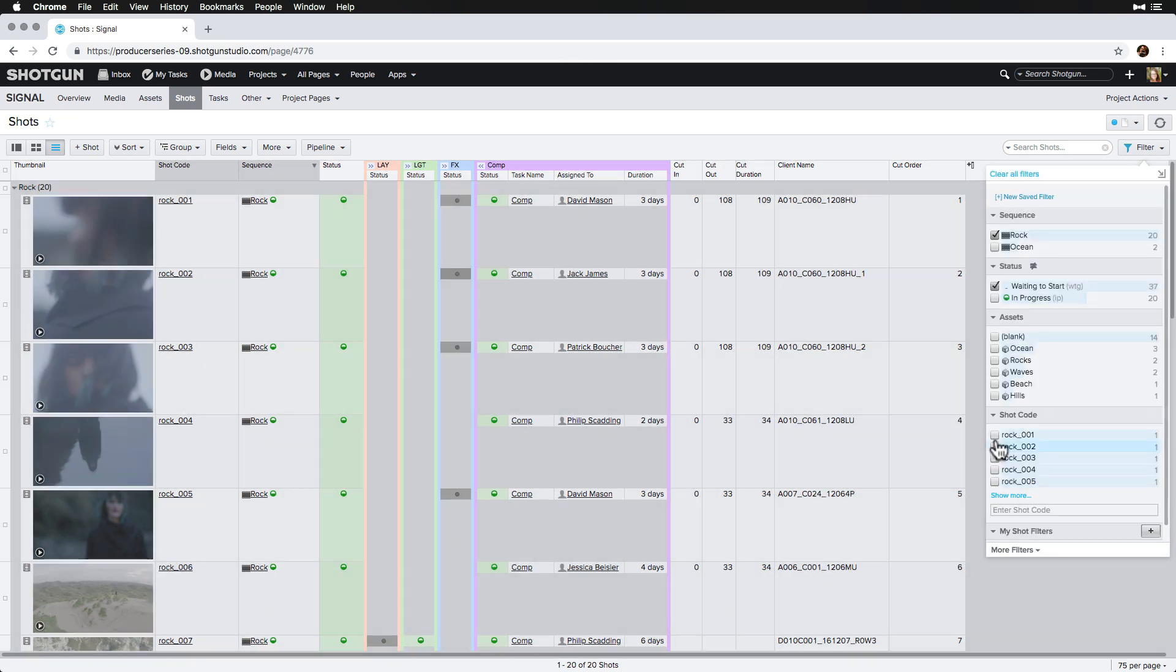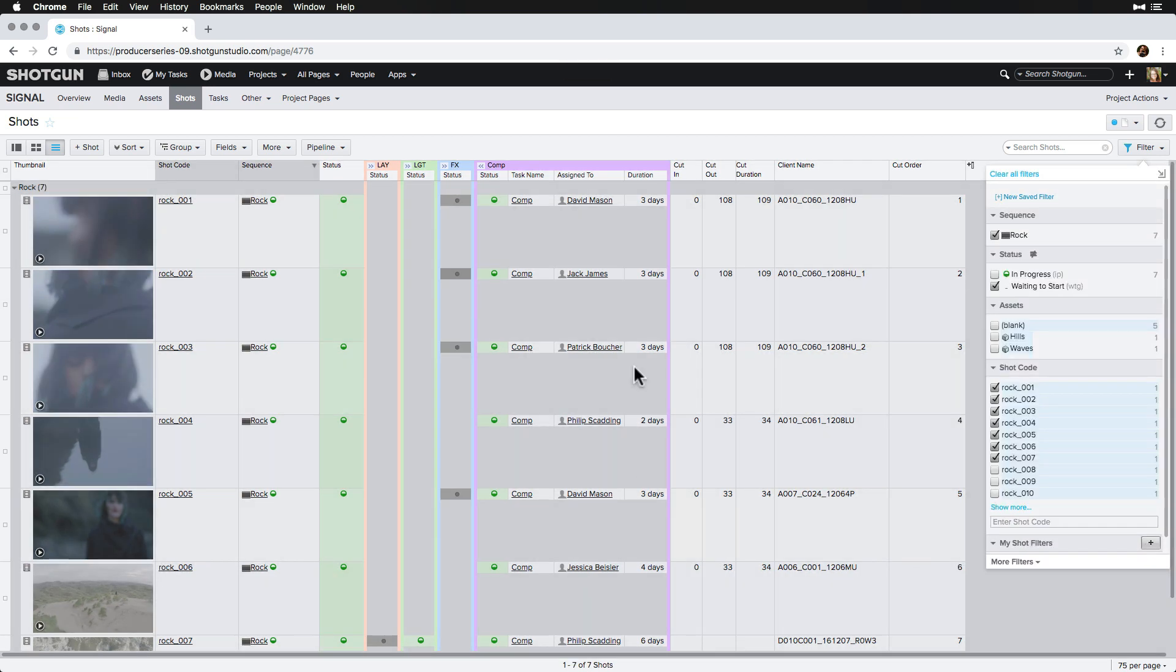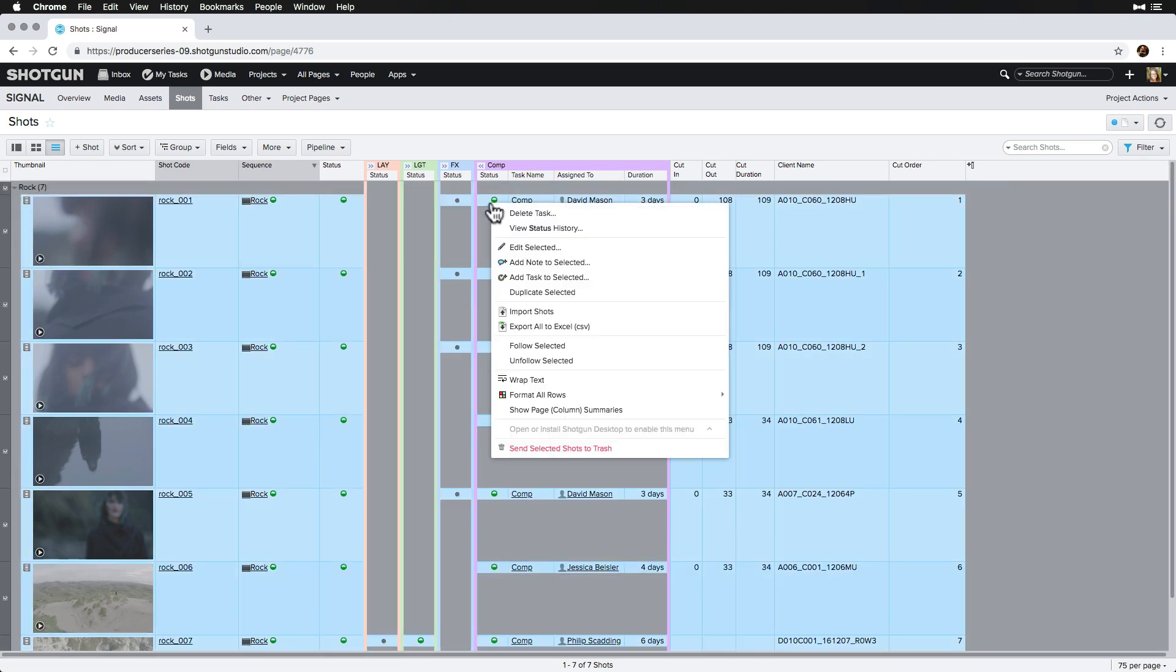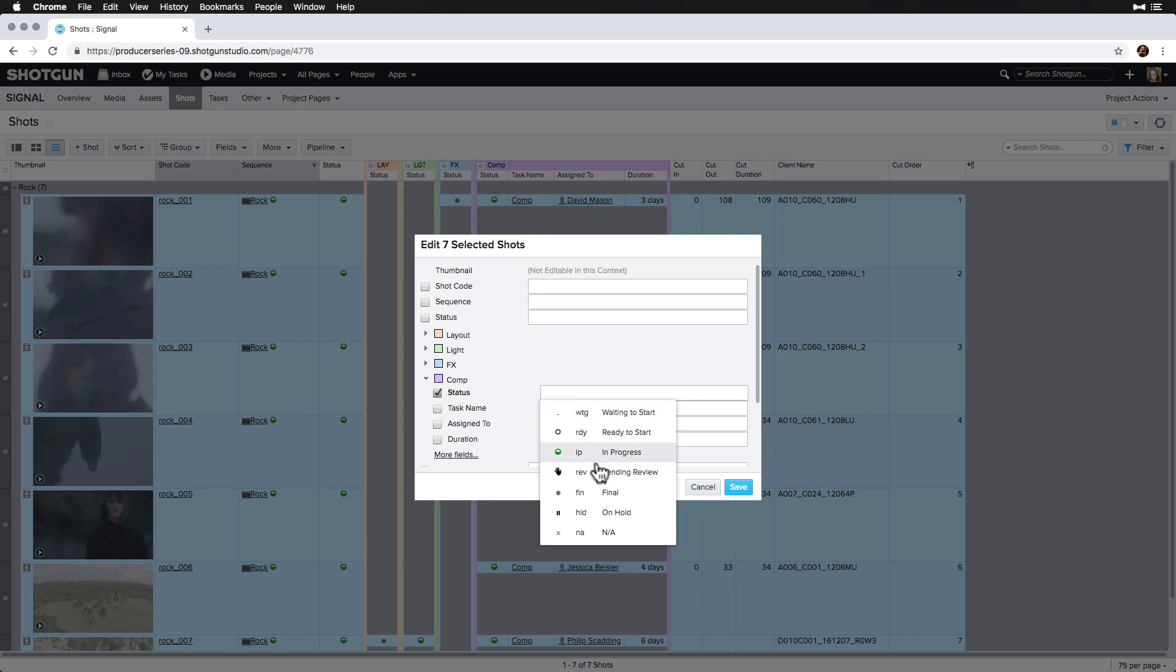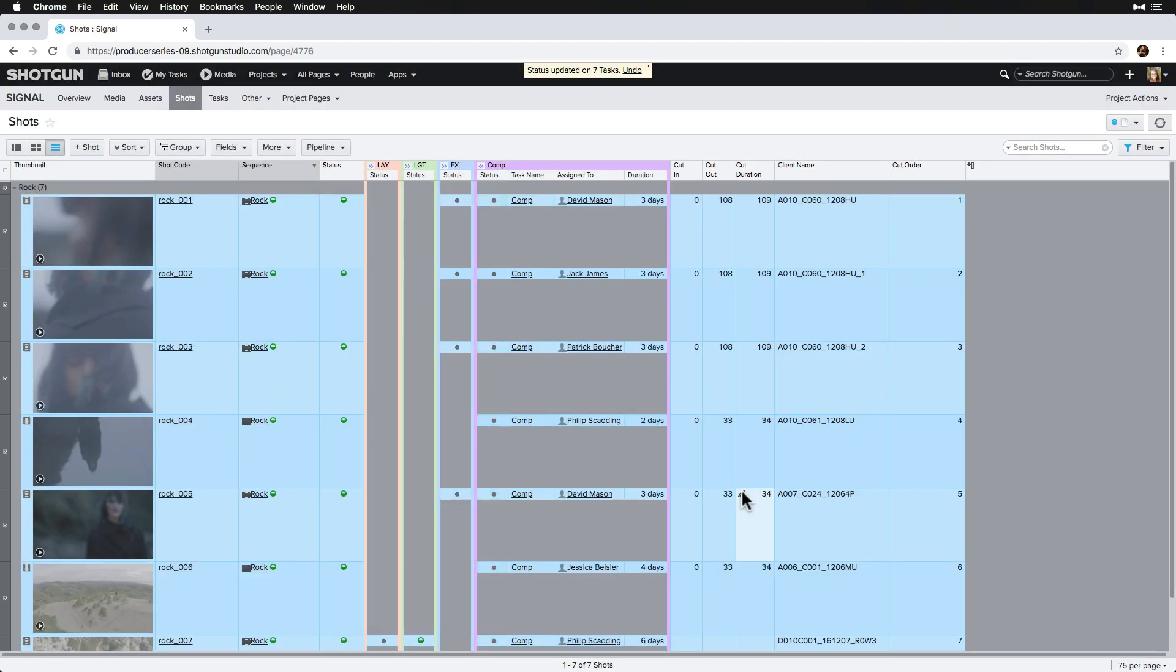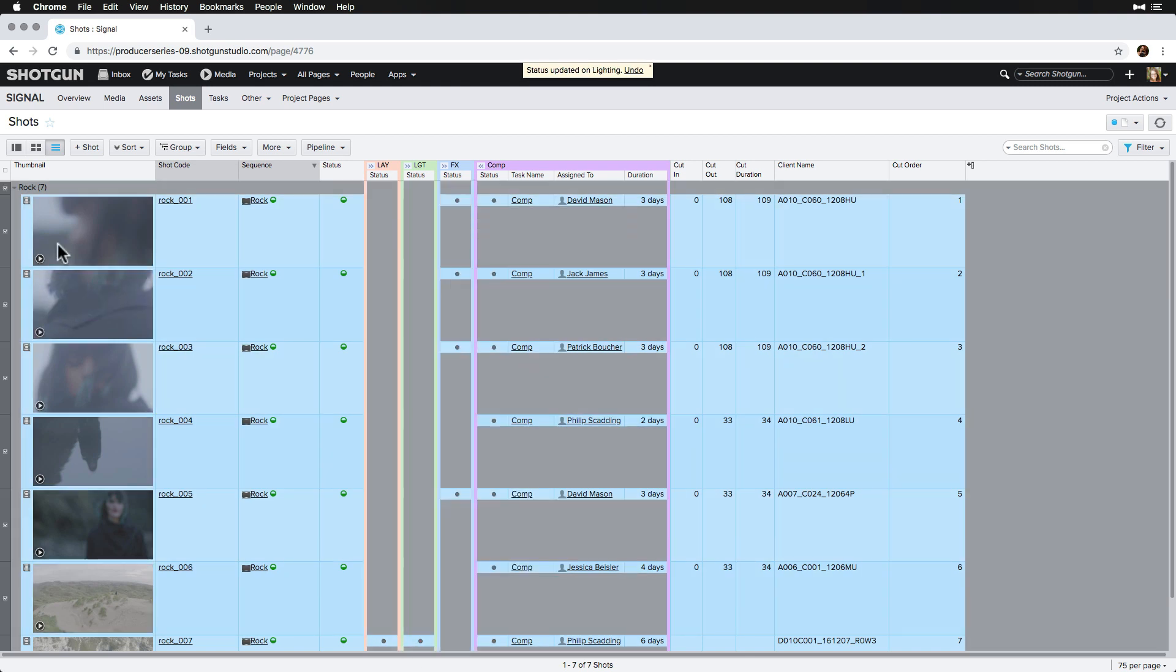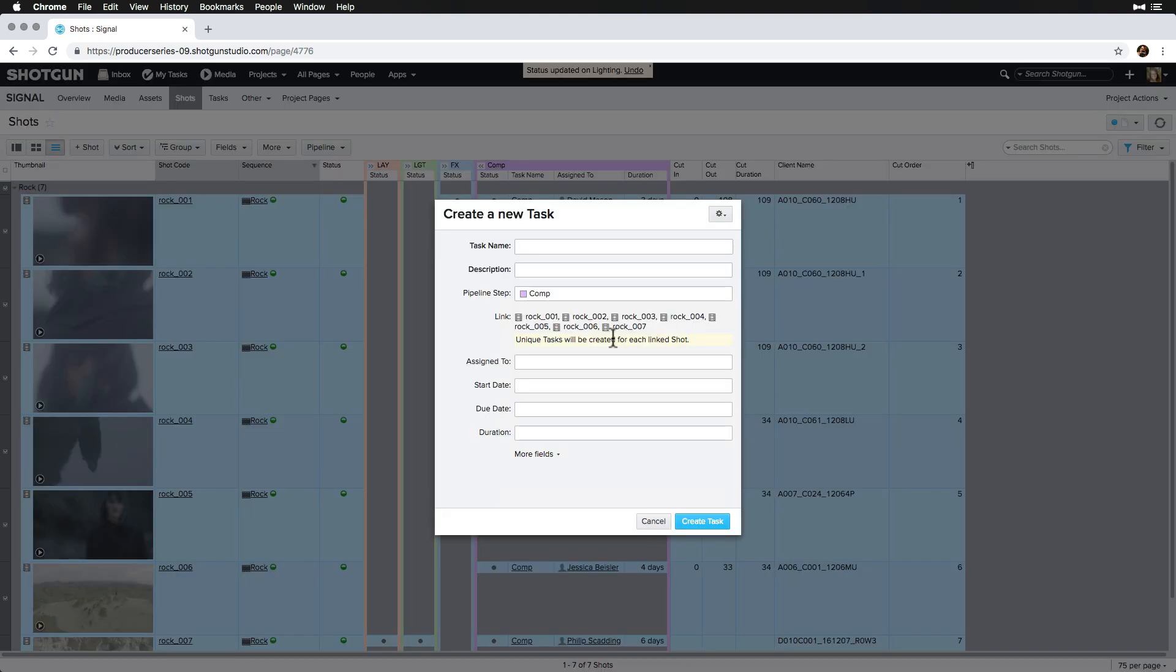First, we filter by the shots that we want to add tech fixes to. Then, we'll select the shots and right-click in the comp pipeline step, final the comp tasks in bulk, and any leftover tasks like this lighting one. Then, we'll select add task to selected, and name it paint fix, and assign them to the comp fix group.